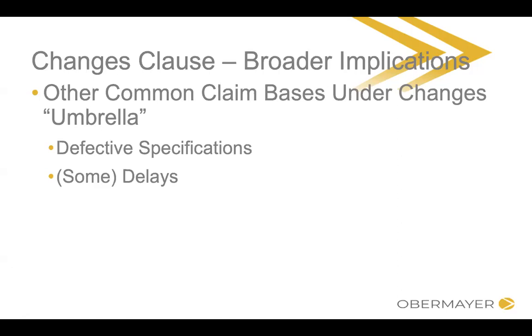You also obviously have heard of delay claims or delay issues. In a lot of cases, defective specifications are always under the changes clause. Delays, if the cause of the delay, the thing that led to the delay, arises out of a change, then your delay claim, quote unquote, is really a part of your changes claim too.